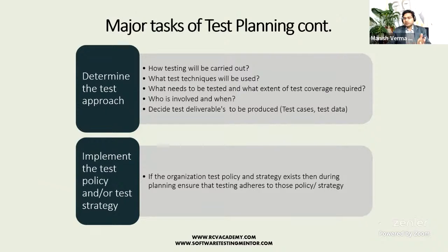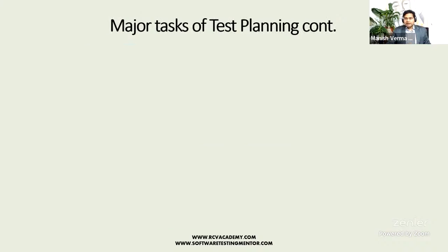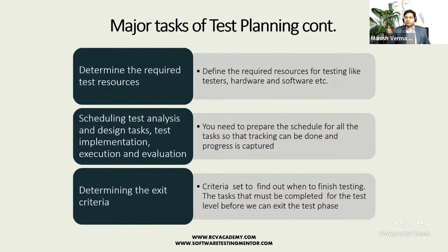Then for the major tasks, you can go ahead and read the slide. How the testing will be carried out, and what test techniques will be used? If, say, there are a lot of web services to be tested, then yes, API testing will be done. What phases, who will be doing what, to what extent, and what the timeline will be, all of that will be the tasks. Then, basically, define the required resources, like who will be the testers, and what the hardware and software requirements will be, etc.